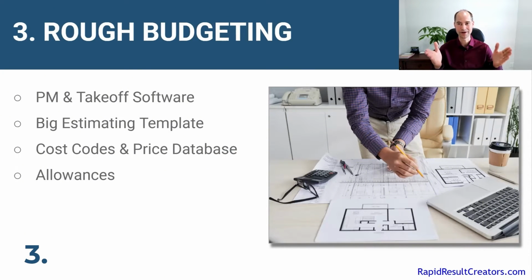In the end, even though you're more correct, you want to be reasonable, but you want to let them know this is base materials. This is what we can build this house for. We can come in at 1.1 million or a million, but this is your baseline. If you want more high-end finishes or you make changes to this, or you want more expensive fixtures and stuff like that, this price can potentially go up over time as we finalize the design and the selections. But you want to start lower, and then you can always add to that price.